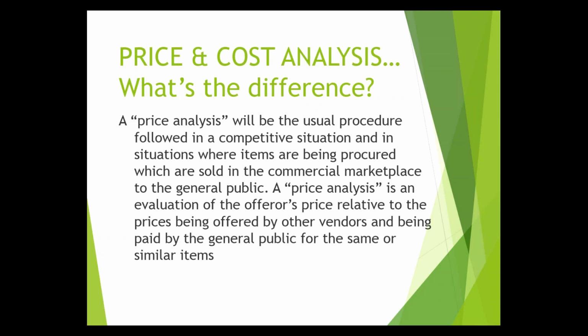So price and cost analysis. This is actually the slide that I'm going to go over quickly. Hopefully we're not going to be in the situation of doing many price and cost analyses because we're going to do such a good job on our independent cost estimates that we're not going to need to. So the price analysis will be the usual procedure followed in a competitive situation and in situations where items are being procured which are sold in the commercial marketplace to the general public. A price analysis is an evaluation of the offeror's price relative to the prices being offered by other vendors and being paid by the general public for the same or similar items.